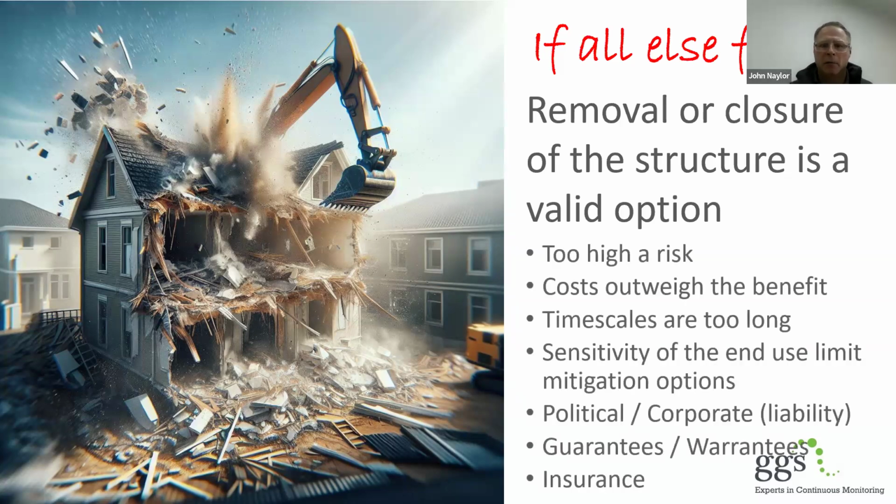Well, it might be it's just too high a risk. It might be that the costs of actually fixing the situation are more than rebuilding. That's not potentially an unusual scenario. Timescales might be ridiculous. We've got to do this, we've got to go back in, and so on and so forth. And also, if it's private residential at the end of the day, some of those mitigation options we've talked about might not be available, because who's going to be responsible to maintain them?